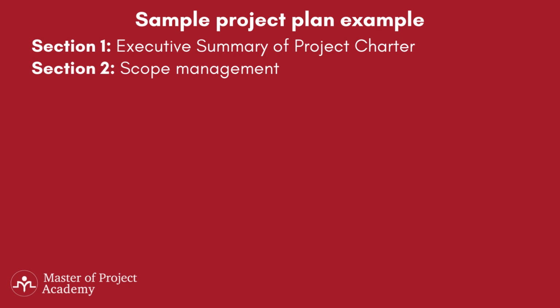Change management plan. Let's say that a development server for your project is administered by another organization that is responsible for installing machine upgrades, and there are scheduled outages that will impact your project schedule. Changes to the project will need to be made to deal with the potential impact of the scheduled outage.